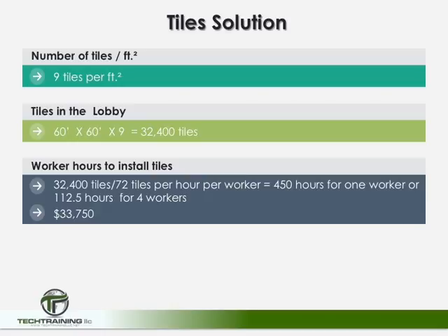Now, if we take the 450 hours and multiply it by the $75 per hour that each worker is earning, the cost of the project is $33,750.